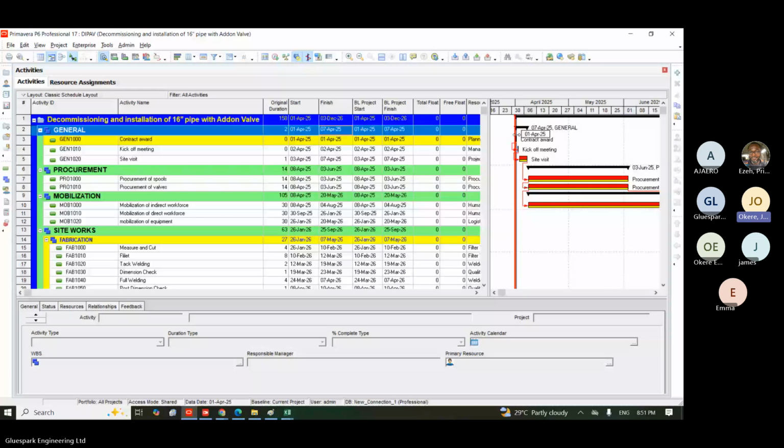Then under April 1 to 3rd, if I select it, I have gone to site, I've confirmed that this thing has been done 100%. So, I want to update. Now, what will happen here, let me do it first and second, because the third one will not update 100% because it's still April 7th. It can only stop in April 3rd. So it will just give me some percentage in April 3rd.